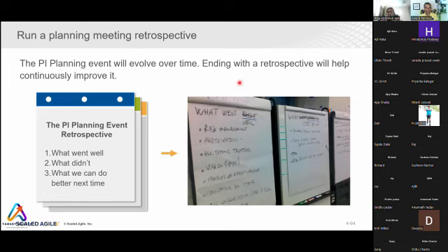In the PI planning, the product manager distributes the features to each Scrum team. Does the product owner decompose user stories in that PI planning, or later at the team level, or is he already ready with all the user stories? It is better, see, in the PI planning you have very limited time. You have to just finalize things. So, as part of the regular refinement, have those features and stories decomposed as much as possible. In the PI planning, you will just do the final touch. You have 2 to 3 hours only.